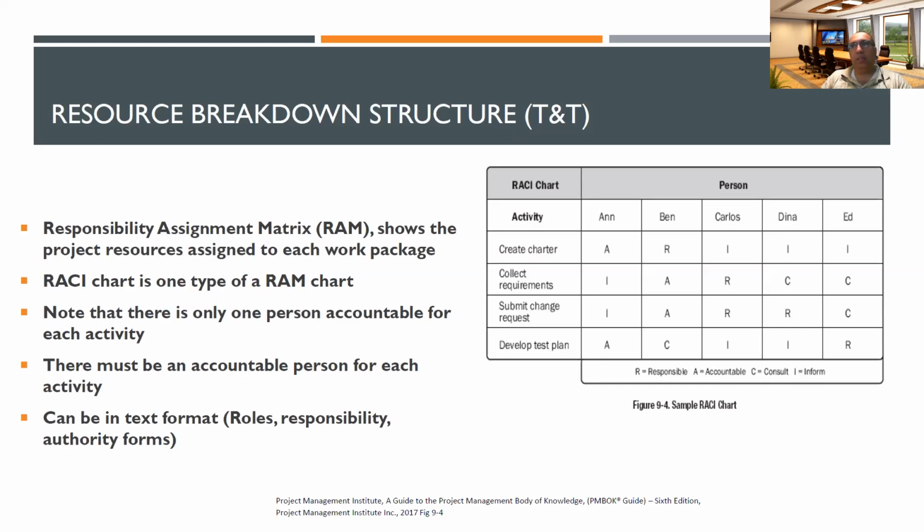So after you complete the work, you have to tell them that I've done this, I've taken out this machine, or we've installed a new one, or we developed this new plan. So that is an inform. You don't want their feedback, you just want to tell them. Consult is you need their input or their ideas before you start the work, right? So this RACI chart is a useful breakdown, it shows very clearly. So if some activity is not done, you may ask the people responsible, but more responsible is the accountable person. They should be aware if that activity is done or not.